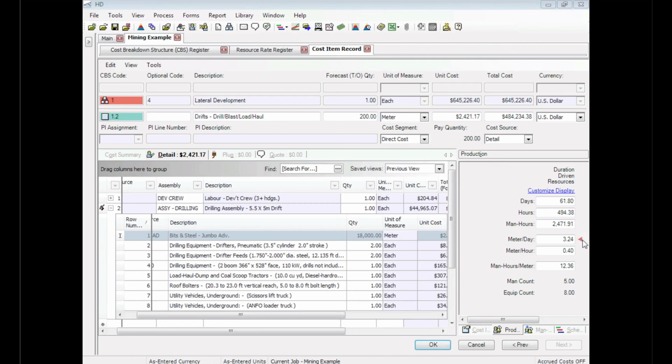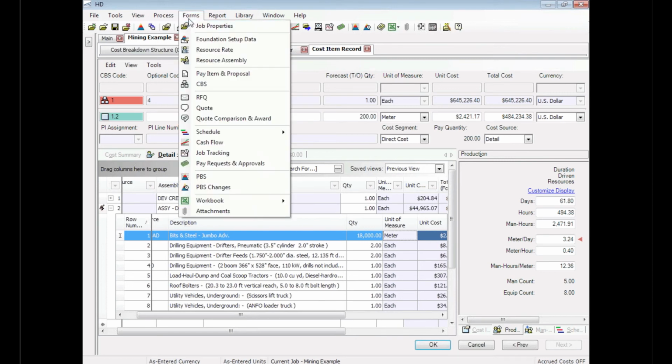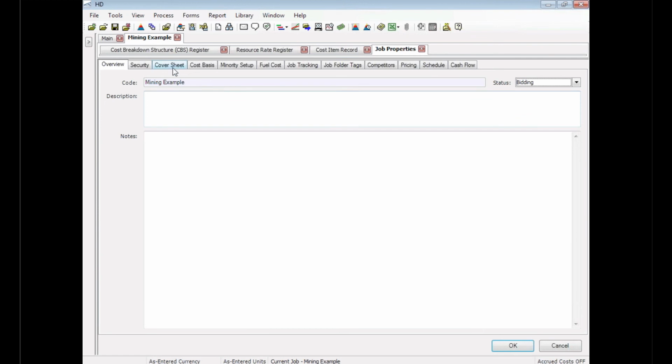That is a great question too, because not only are the labor rates available, but they're also available from a geographic area perspective. So you may have 6 different sets of labor rates for different geographies, maybe one down in South America, one up in Northeast Canada, for example, all relative to the same WBS structure, but all supporting a different geographic area for those labor rates. So you don't have to change the structure of the job. I simply have to say, these are the labor rates I want to use. And the cool part about that is, again, it ties right into the InfoMine database, so I can get a good running start with it.